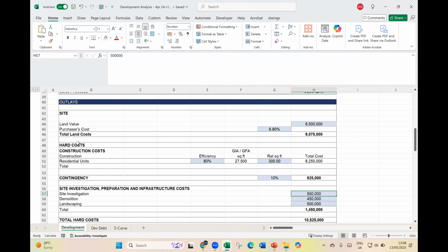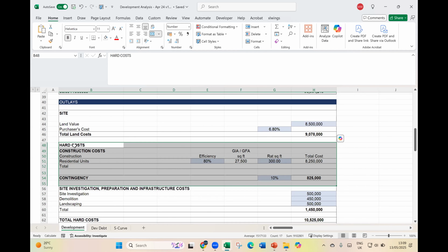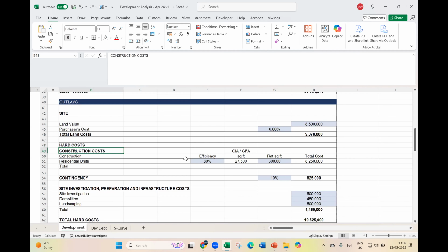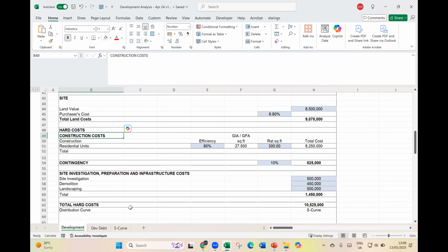And then here as well, we're going to have the inputs, which are the hard costs. So that's construction costs. Mainly in the UK, that's how we tend to split the costs between hard costs and soft costs. Okay, so maybe somebody there is practicing from Germany, and in that case, they use different ways to split the costs. But in our case, it's soft costs and hard costs. Always assume a contingency as well, right?